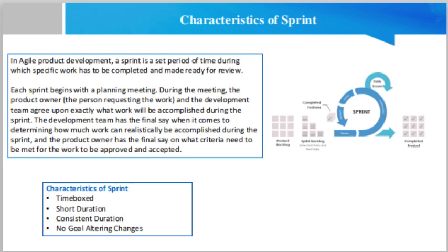Once the sprint starts, it's not allowed to make changes which can result in the sprint not accomplishing its goals. It helps the team to focus on the work without any distractions from changes. So that means we cannot make any changes? Well, Scrum encourages closely working with the product owner and taking regular feedback. It could result in some suggestions and improvements. Minor feedback that does not impact the sprint goal can be incorporated. However, anything significant cannot be included.